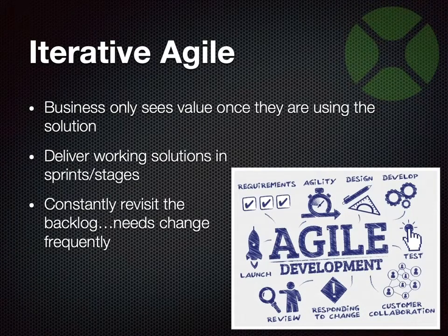I've worked in multi-year development processes, and we've ended up at the end, for example, with a large SAP thing, and a lot of what we had done just didn't apply anymore. It was millions of dollars that was kind of wasted because we were just not fast enough to deliver for them. So Agile development.